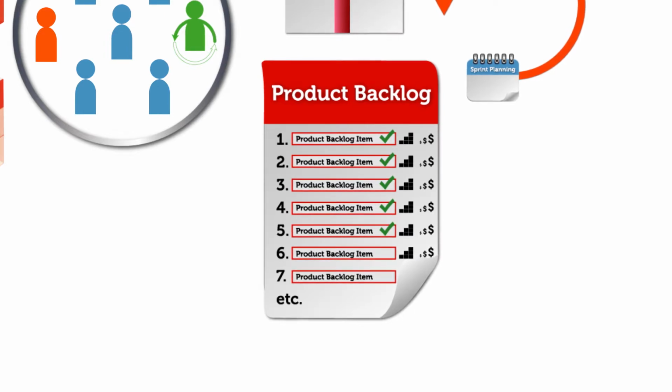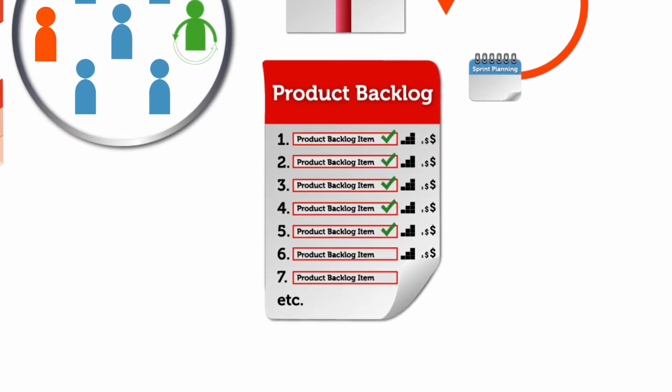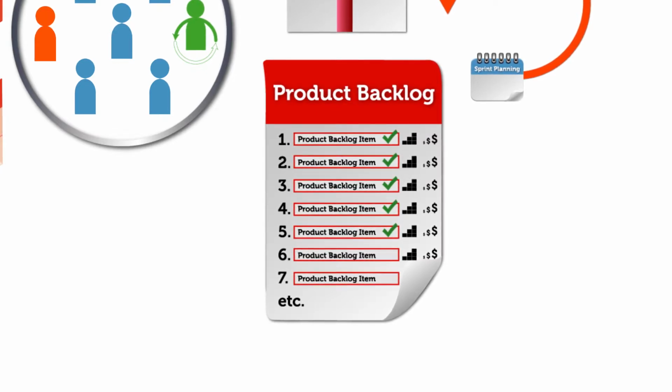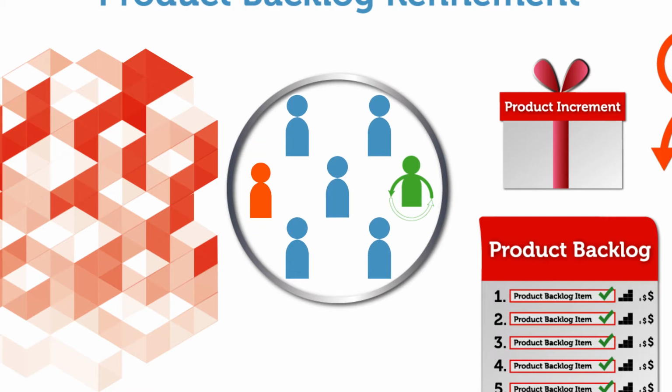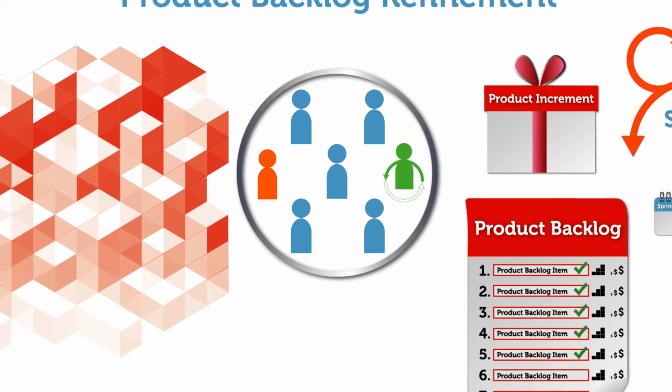This just-in-time product backlog refinement eliminates the waste that is possible when trying to provide clarity and detail for every known item long before it is pulled into a sprint. The product owner and development team collaboratively refine the product backlog. However, product backlog items can be updated at any time by the product owner or at the product owner's discretion. The development team is responsible for providing estimates.